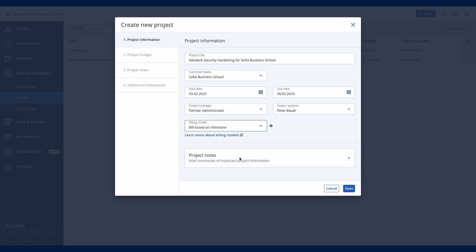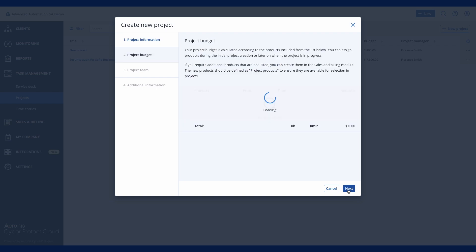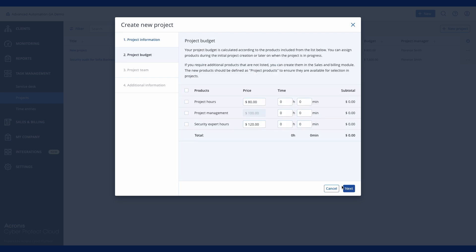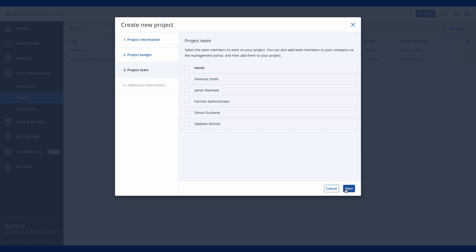In the second step, define the project budget. Acronis PSA offers default project products like project hours, but you can also create your own project products and define their prices and cost. For this example project, we'll use project hours with a standard price for 30 hours total to bill.